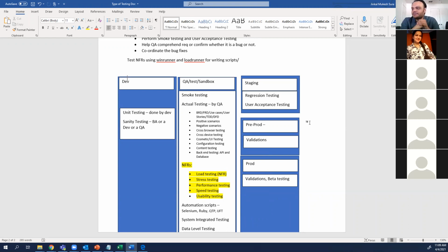You were saying something, Amir? Yes. In Agile, when something is a defect, you put it back in the product backlog or back into the Scrum, there is a story, right? Under the story, there will be a defect assigned. I said whenever you create epics, features, or stories, under stories, there will be tasks and there will be bugs. So for that story, if there are 5 bugs, it will be tied to that user story in Azure DevOps.